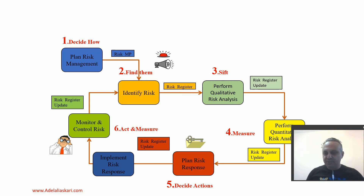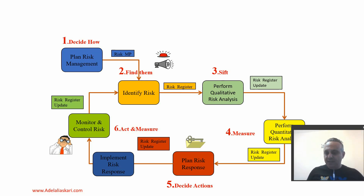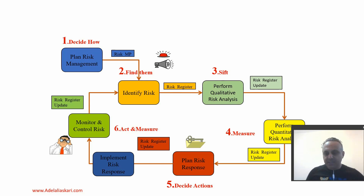By having this document in hand, we shift to the first process of risk identification. The ways and methods of risk identification can include, but are not limited to, workshops, interviews, brainstorming, the Delphi technique, and so on. After identification, we have a long list of identified risks called the risk register. Please note that risk identification is a human action — software and systems cannot understand anything about our environment, the attributes, circumstances, or context of our project. We have to identify our risks by our team.